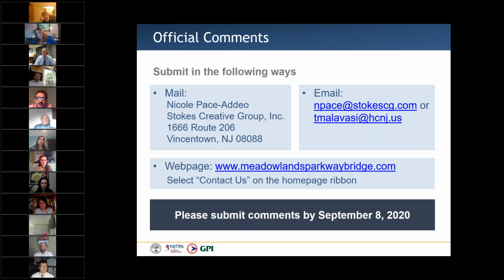We can talk about some of the improvements that you want to see, but once we end today's meeting, we're going to quickly finish up the purpose and need statement, and then we're going to start developing alternatives. Once we start developing the alternatives, we're going to come back again and present these alternatives, and then we could have an even better discussion. Generally, I find the second discussion is more where you'll be seeing some of the improvements that are possible. So this is nothing that's been set yet. We're at the very beginning.